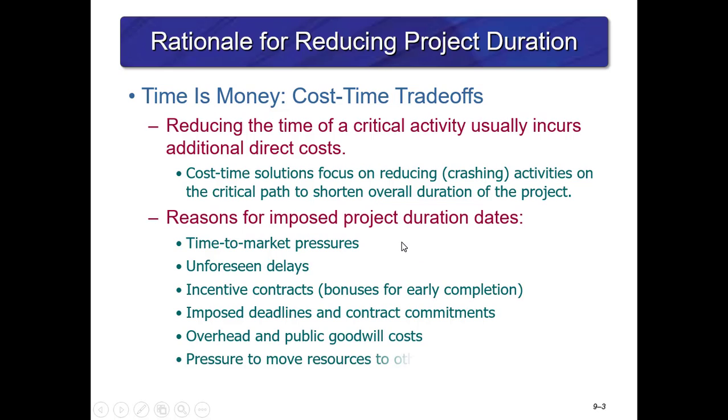Reasons for imposed project duration dates are shown here. Unforeseen delays, incentive contracts, which plays out in construction quite a bit, overhead and public goodwill costs, pressure to move resources to other projects, and other internal organization requests in order to finish a project earlier than planned.